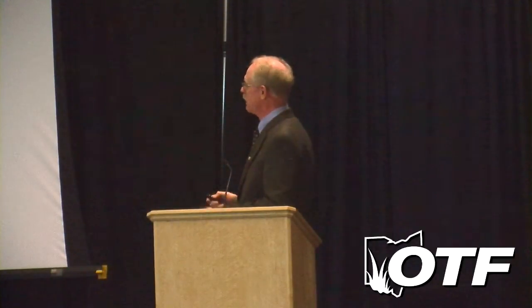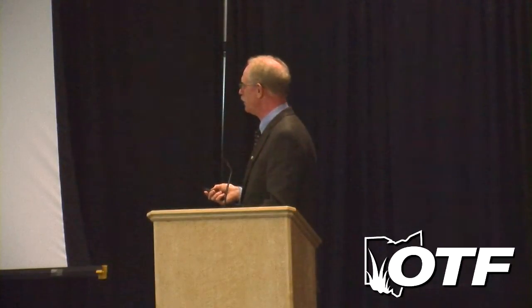This is applicable to the Midwest, Ohio area, even though it is in Rhode Island, because they use bluegrass all around the bunkers. It's about the only course in New England that uses bluegrass around their bunkers entirely. It's a Donald Ross course from 1914. It's been a perennial top 100, and very well known place. They got a really good price. $672K for 105 bunkers. We put some back in. One or two came out, and it came out to almost to the penny $6,400 per bunker.